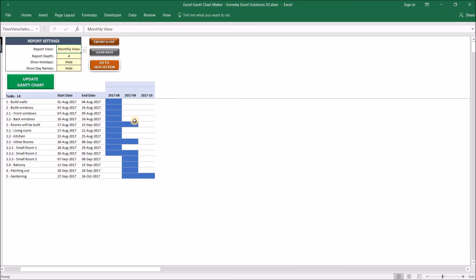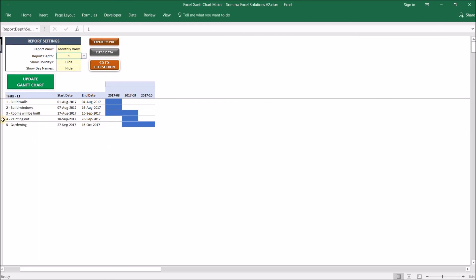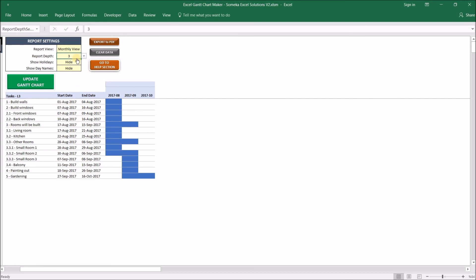Okay, the last feature here is really cool: the Report Depth feature. Let's say you are the boss and are not interested in details—just want to see the big picture. Report Depth is used for this purpose. If I decrease the depth to level one, for example, it will only show me the main tasks. So if I want to go back and make a micromanagement for each of my tasks, I will choose the highest number possible. And let's choose Weekly View.